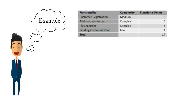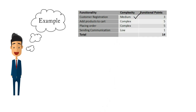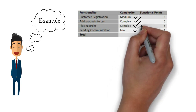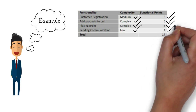We need to categorize these functionalities under the complexity buckets. In this example: customer registration has complexity medium, adding products to the cart is complex, placing the order is complex, and sending communication to the customer is low. The next step is to give the functional points based on complexity — customer registration gets 3, adding products to the cart gets 5, placing an order gets 5, and sending communication gets 1.